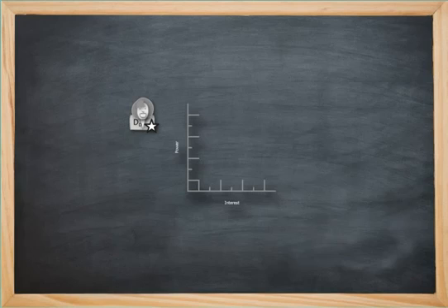She has her own projects to deliver, and she is somewhat interested in the success of the project. She does have the power and the ability to pull strings or to help resource-wise if necessary. So we're going to evaluate her. She has the power of 4, which is roughly here, and the interest of 2. So there, we've placed her.